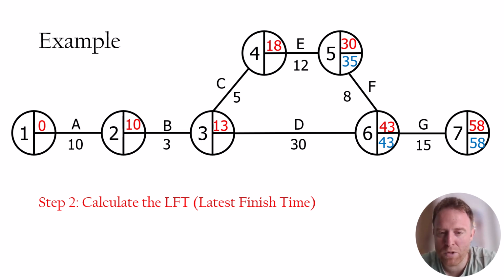That might give us an idea as to how we can allocate our resources, and it might help us to think, okay, well, should we be maybe allocating our resources towards activity D more than, for example, activity E or activity F? Because what it simply means is D is more critical, because if there's any delay with D, then it's going to delay the whole project.